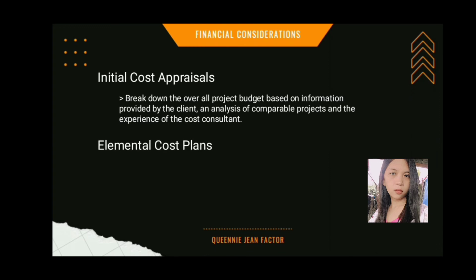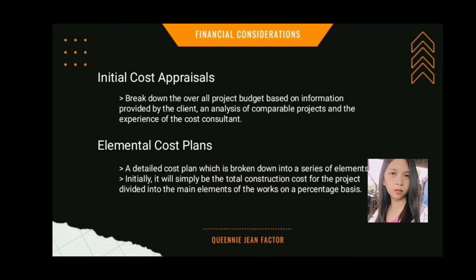Elemental cost plans. A detailed cost plan which is broken down into a series of elements. Initially, elemental cost plans will simply be the total construction cost for the project divided into the main elements of the works on a percentage basis.